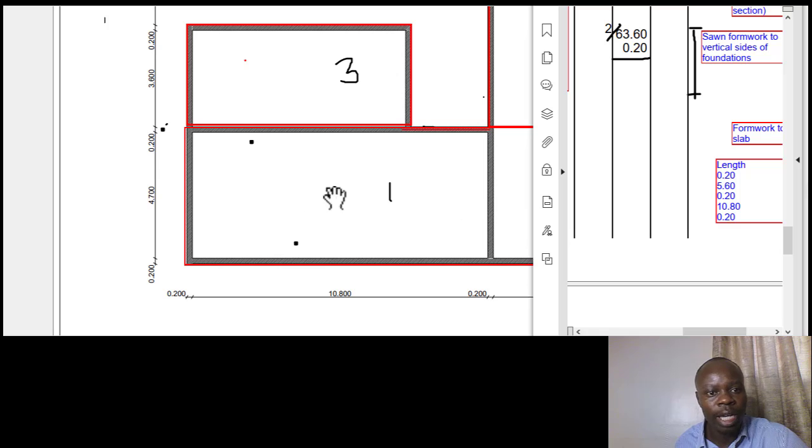And then we'll get this the basic way in which you would calculate the perimeter of a perfect rectangle. Then we will of course add what we call the recesses, because this plan is not a perfect rectangle. So we'll get the length.